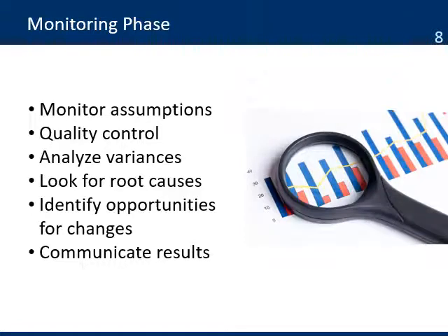Key recommendations during the monitoring phase. You need to monitor assumptions. Assumptions tend to change, and they need to be checked on a regular basis to ensure they're still valid. If they change, it will require a revision of the approach, the plans, and even the project logic.